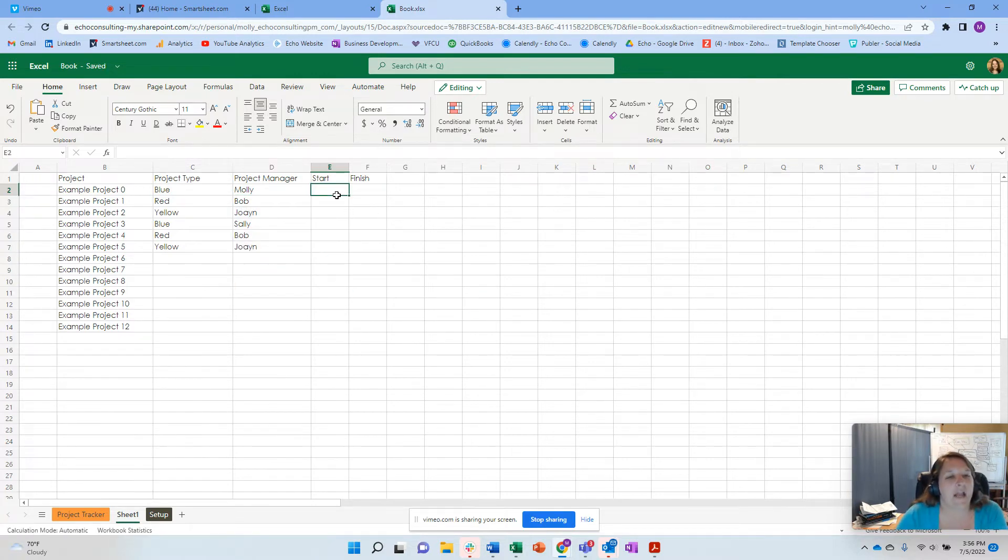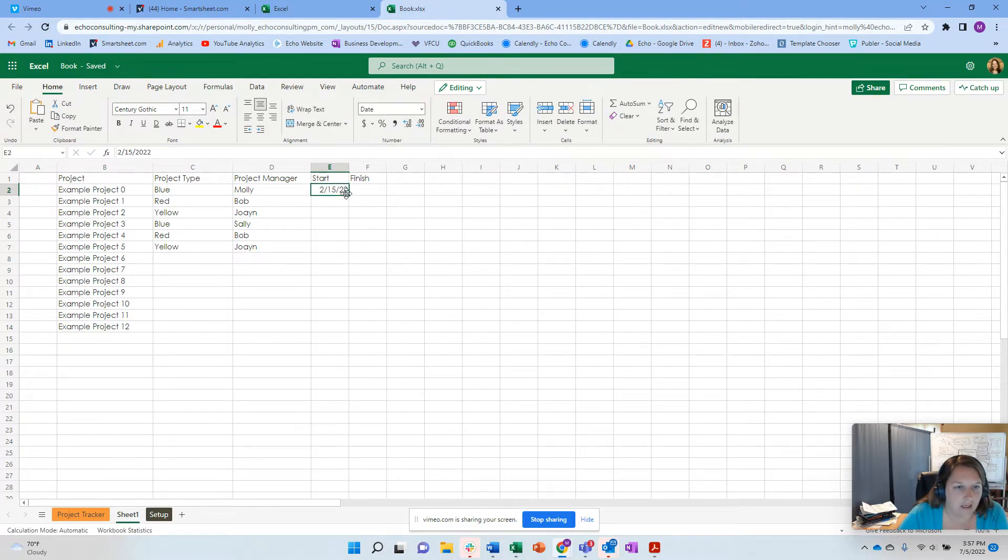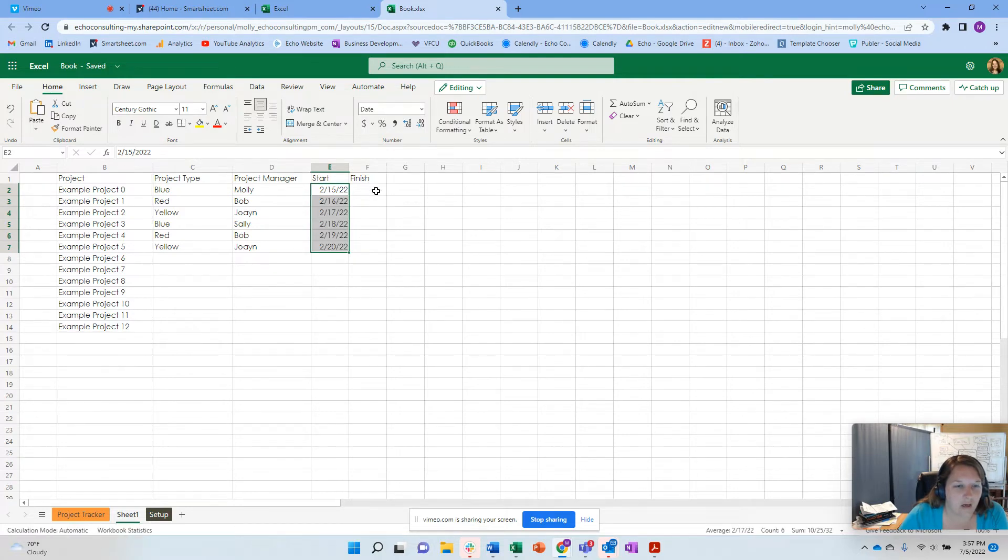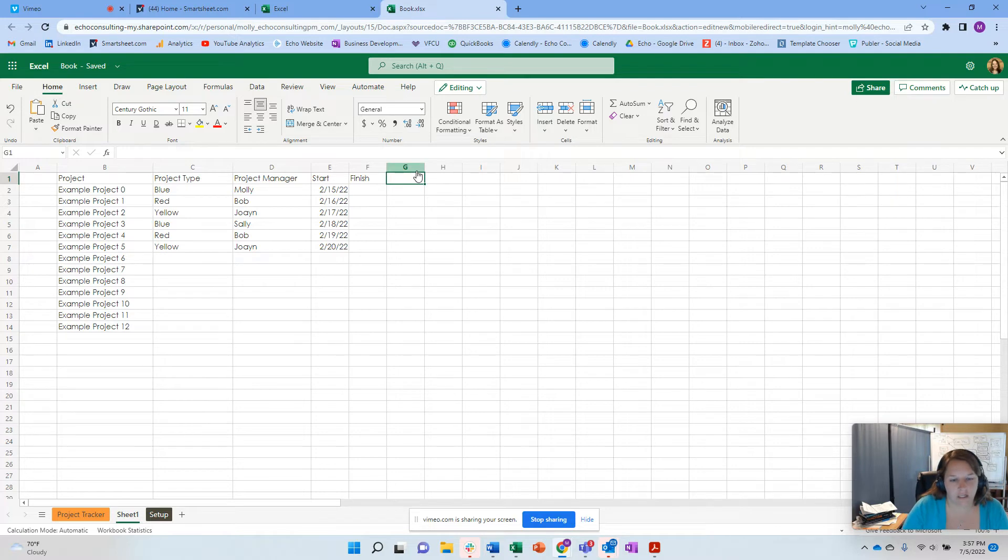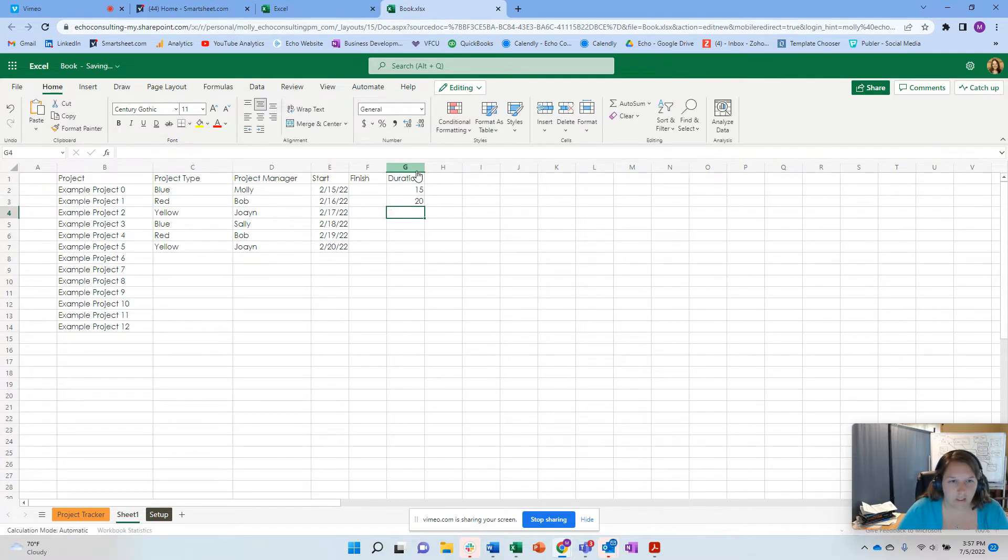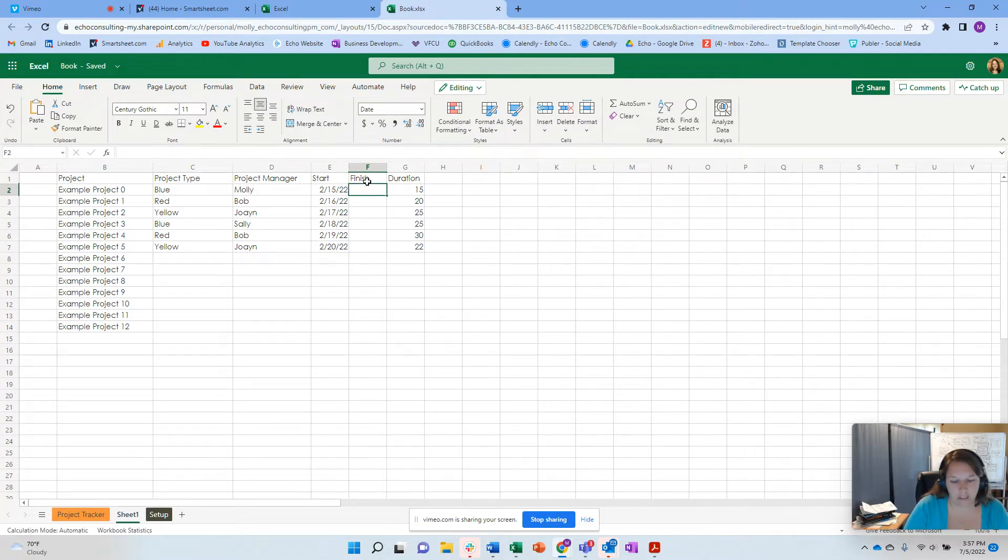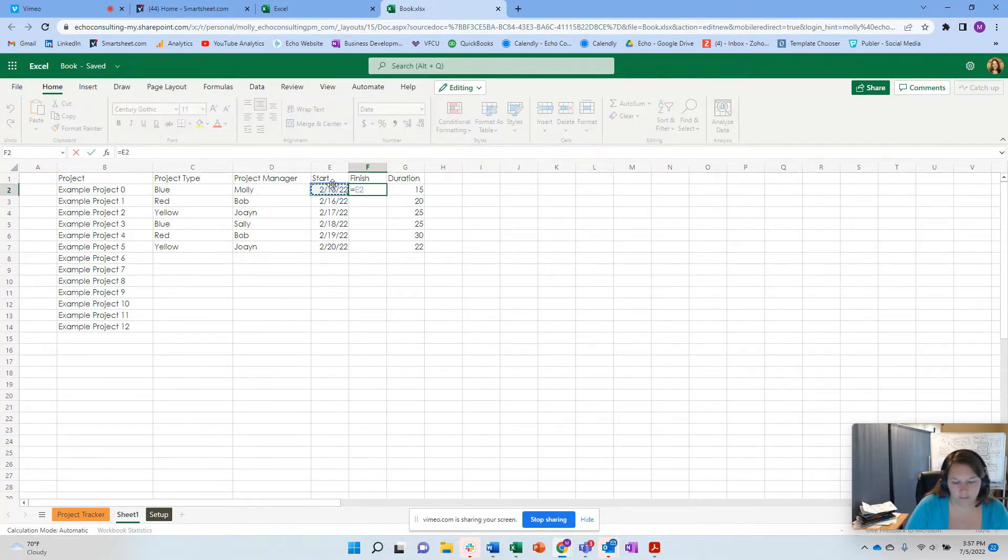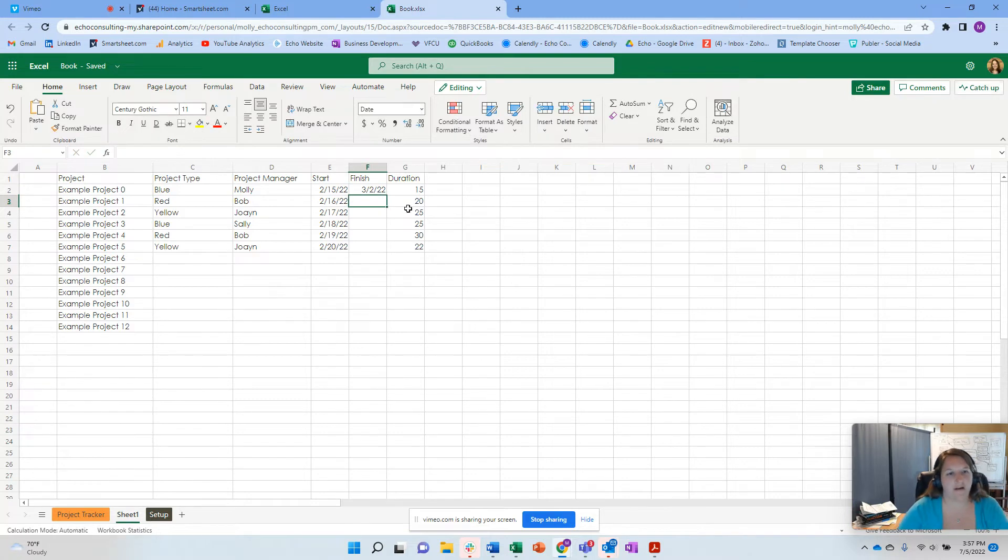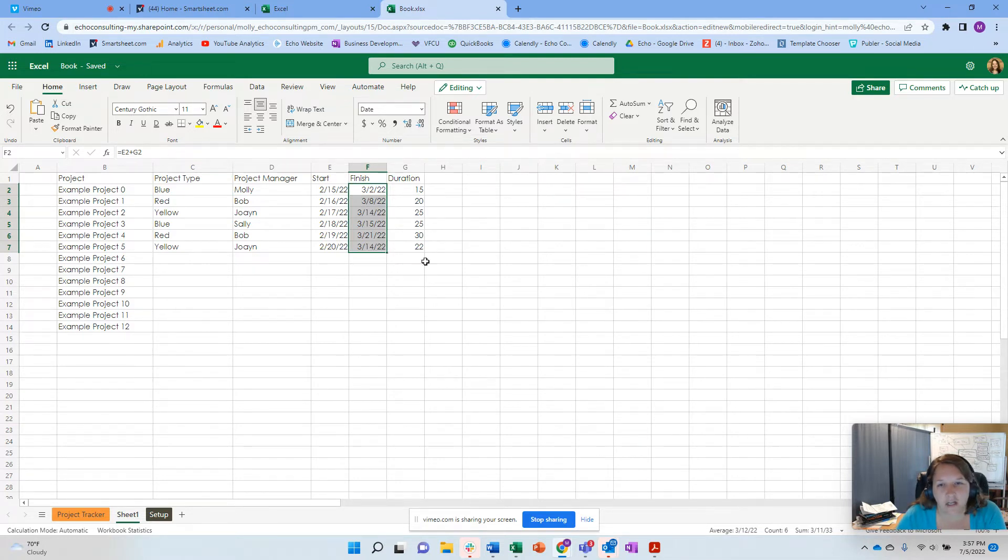And we're going to do the same thing here. Molly, Bob, Joanne, Sally. And then let's just say we do this again. Copy it down. And then I can do this date and I can pick a date to 1522 and copy this down. And finish this. So let's do duration here. 15, 20, 25, 25, 30, 22. So equals this plus duration. So now I have dates based on those durations. And I'm just going to drag and drop that down here. And it updated all these different things. So basic concept here.